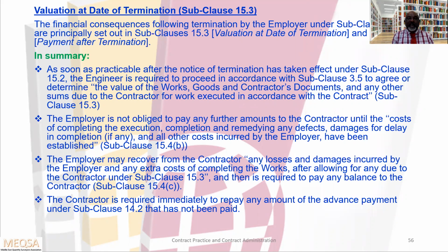The contractor is required immediately to repay any amount of the advance payment under subclause 14.2. These are the consequences of default of contractor, the valuation at date of termination.